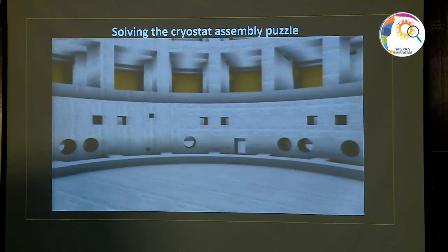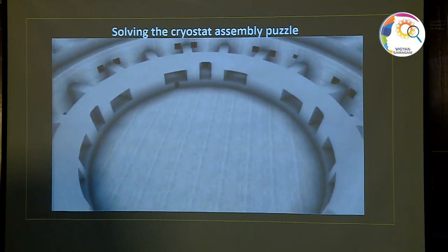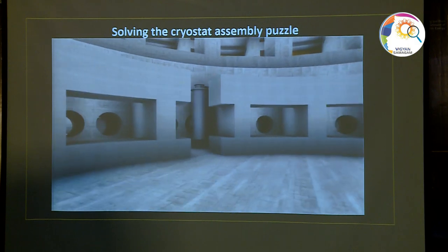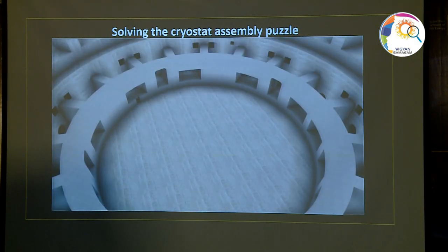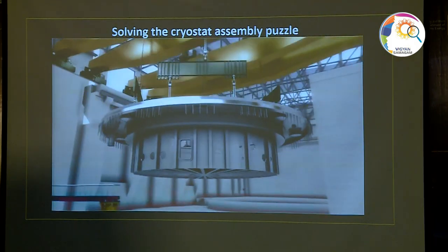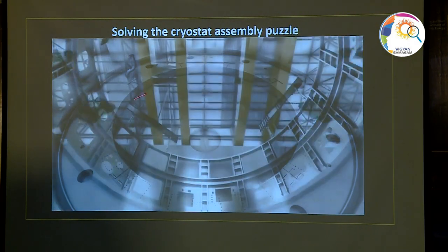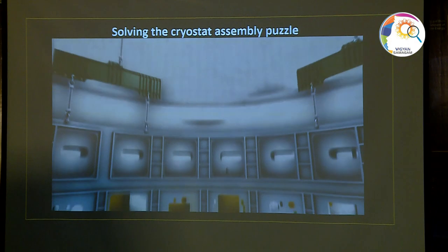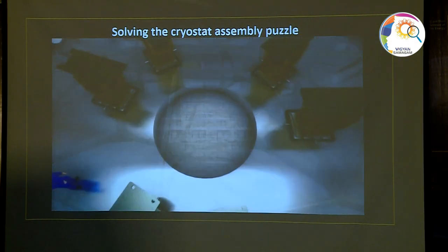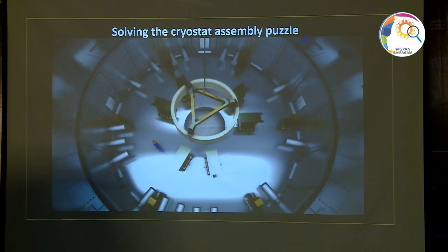Assembly of the ITER tokamak will proceed in a bottom-up fashion. First, the lower feeders for the ITER magnets will be put in place. Then the base of the cryostat, the largest single component of the ITER machine, is lifted into position. The next components assembled are the lower cylinder of the cryostat, thermal shields, and the temporary support structures for poloidal field coil number 6, the smallest of the set of 6.